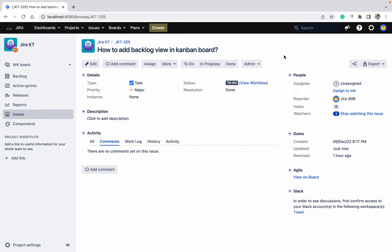In Jira there are two types of boards available: one is the Kanban board and the other is the Scrum board. In the Scrum board you can see all the details — things like epics, backlog, etc. But in the Kanban board you cannot see the sprint or the backlog.